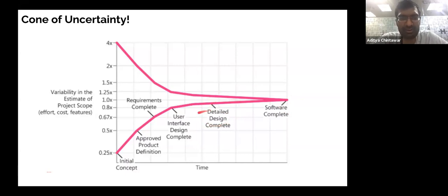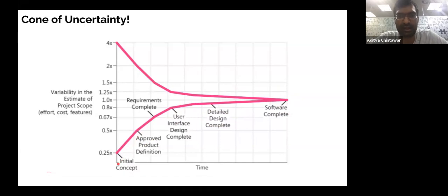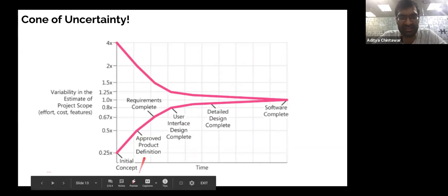I usually prefer doing estimation from this stage to this stage at once, saying, okay, by when can I give the first cut of the PRD? Even if I don't have the full cut of the PRD, but it's a super urgent requirement, what I might do is get my objective, risk, assumptions, and the feature stories at one place, give it to my engineer, and try to get their feel in terms of how complex they feel this actually is, until the design gets complete.